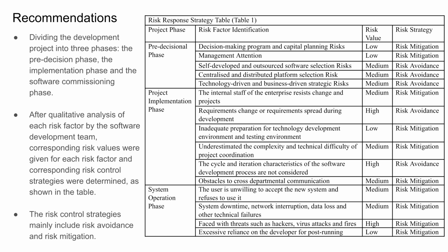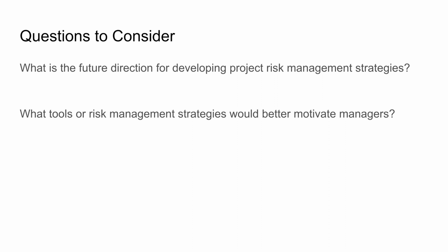The second solution is to set up a requirements change control committee. The last solution is to use the requirement change control system. This system should estimate the change degree caused by the request to change requirements and analyze the change of the development work. Finally, the final decision on the change will be made, and the results will be recorded in the requirements repository. Two questions to consider.